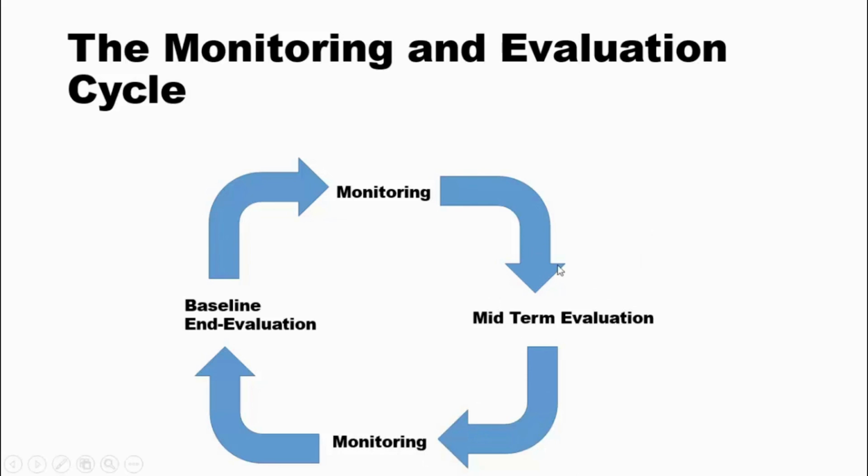So this is very important, especially for long-term projects that are maybe 4 or 5 years. You can do it for a 3-year project, but I think if your project is 5 years, you need a midterm evaluation. After the midterm evaluation is done, you do the monitoring business as usual until you reach the end of project evaluation. The end of project evaluation is similar to the midterm evaluation. Same methodology, probably the same consultants that you used to do it.